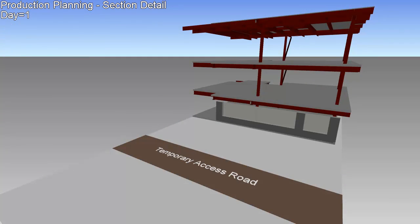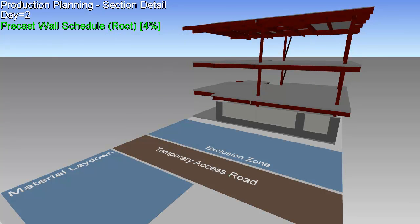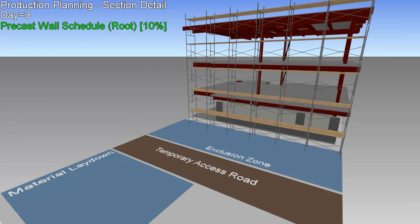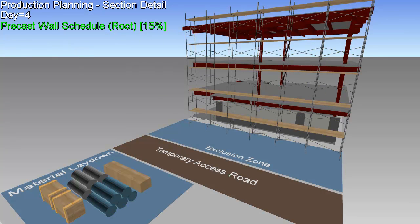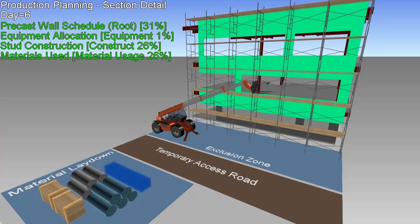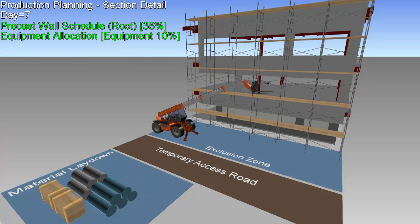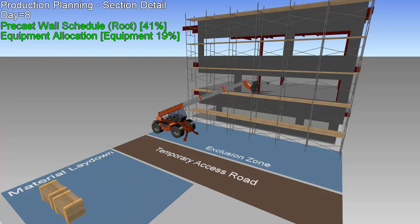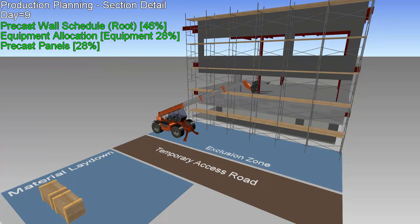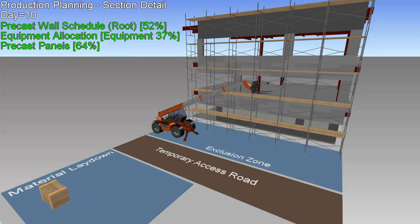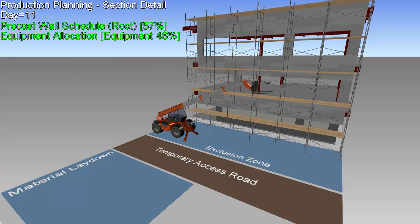These project planning tools can also be used to test and refine what-if scenarios before going to the field. Here we see a visualization of how the curtain wall panels and windows will be installed, including locations for the heavy equipment, staging areas for the materials, and safety considerations.